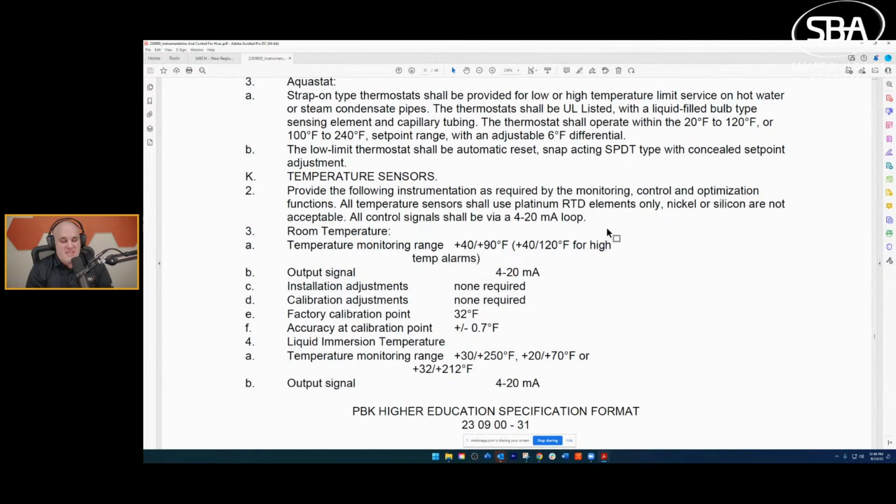If you can submit that and get it approved, you've just dropped your material cost by $30,000, which when you apply margin on top of it, may be $35,000, $40,000. You've just made yourself much more cost competitive. And so it's important to read through these, not just from a selection perspective, right? Not just saying, oh, I'm going to select my materials. It's also from a cost perspective and a strategy perspective.